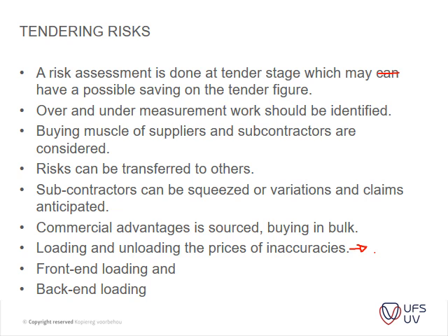Okay, front-end loading, that was what I was talking about just now, where you load your items at the front of your project, for instance, your excavations, your concrete work, and so on. Obviously, you do that discreetly, and you only make slight changes at the front, because the bigger you're loading at the front, the higher your risk will be.